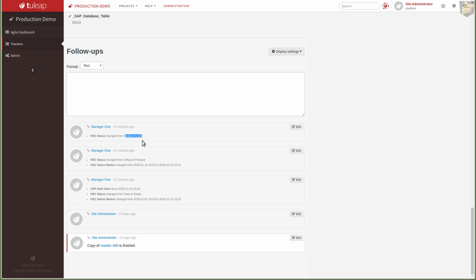So you can mark each one of these to give yourself a good idea of how long each stage took, so that maybe later on you can define your process or workflow better, and know how long something is going to take, or how much something is going to cost. If you originally estimated it taking 15 minutes and it takes 15 hours, maybe it's time to take a look at adjusting that.